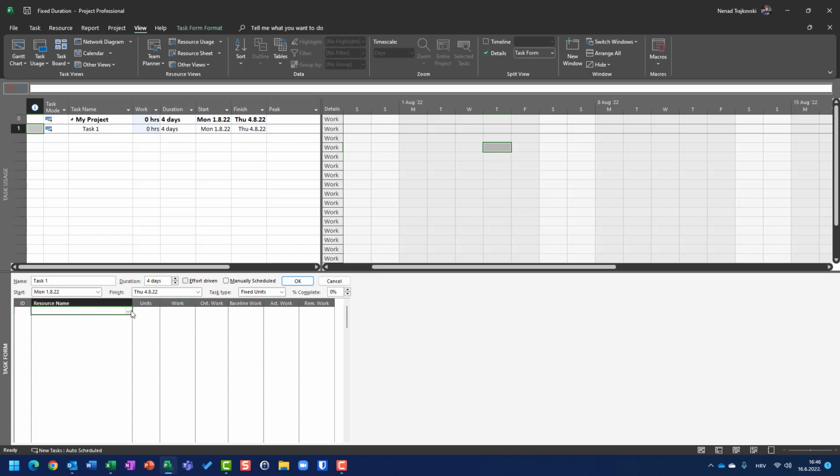So, when I assign John here first, I have John with 8 hours per day, 4 days. When I now assign Mary to a task which is non-effort driven, Mary is going to work as John is supposed to work, so it is 32 hours in total, 8 hours per day, and I got the same result as I would have if I assigned them both in one hit.